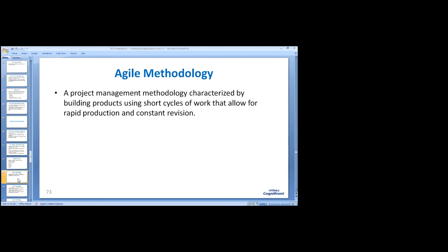But what happens during this long period of, let us say, 1 or 2 years? Many things happen. Many people leave the company. Many new people join the company. Moreover, new kinds of technology come into the market, and the requirements keep changing. So when the requirement changes, the project which is completed after a period of 2 years becomes useless, so it has to be thrown away. And that is why for IoT development, we use the so-called agile framework or agile methodology.